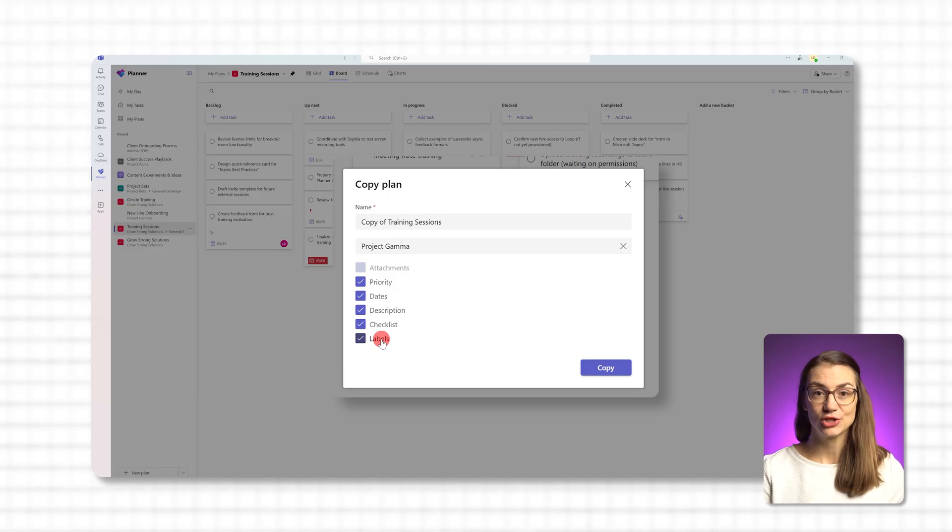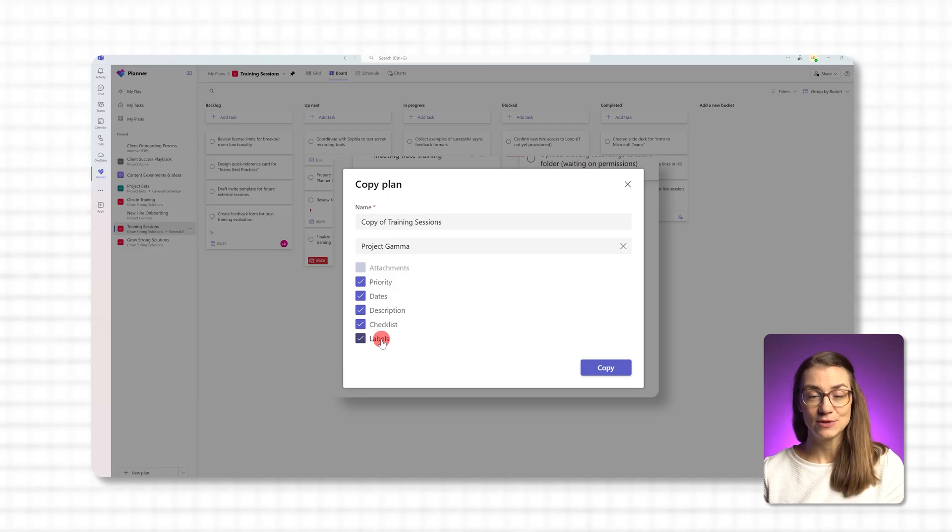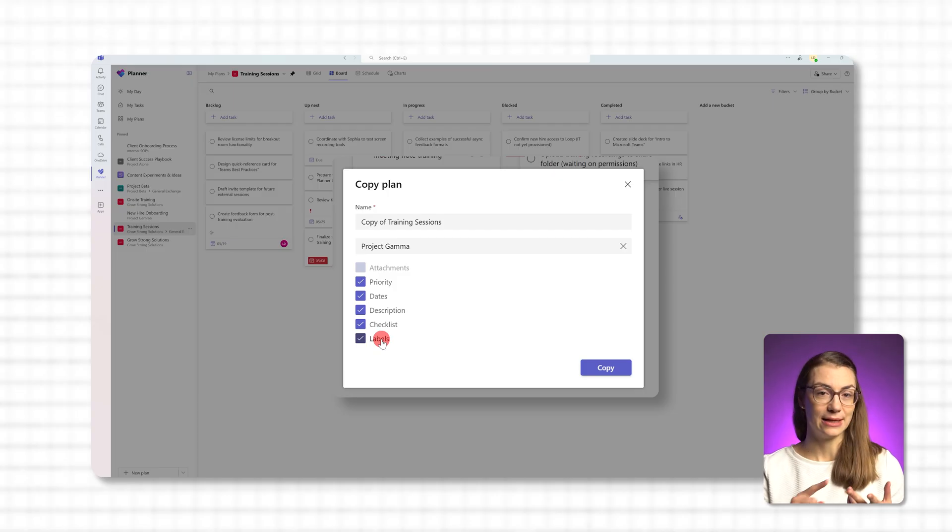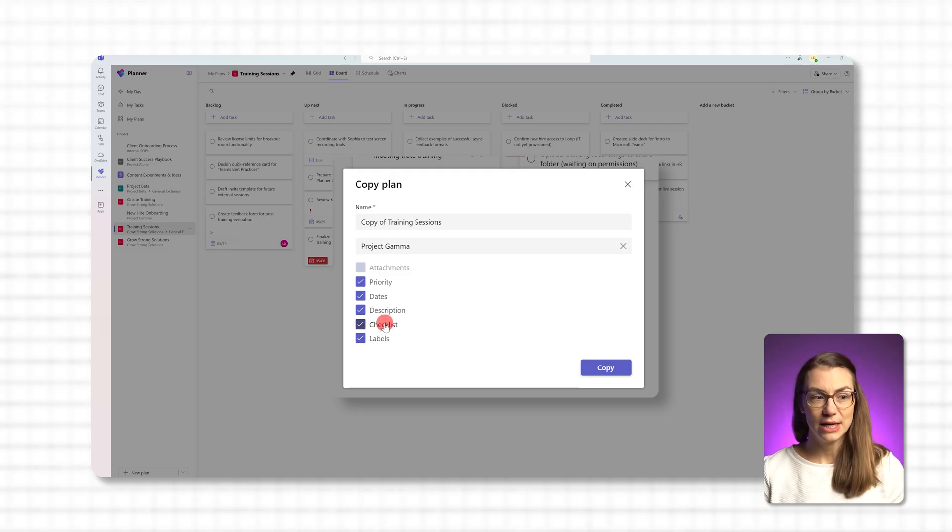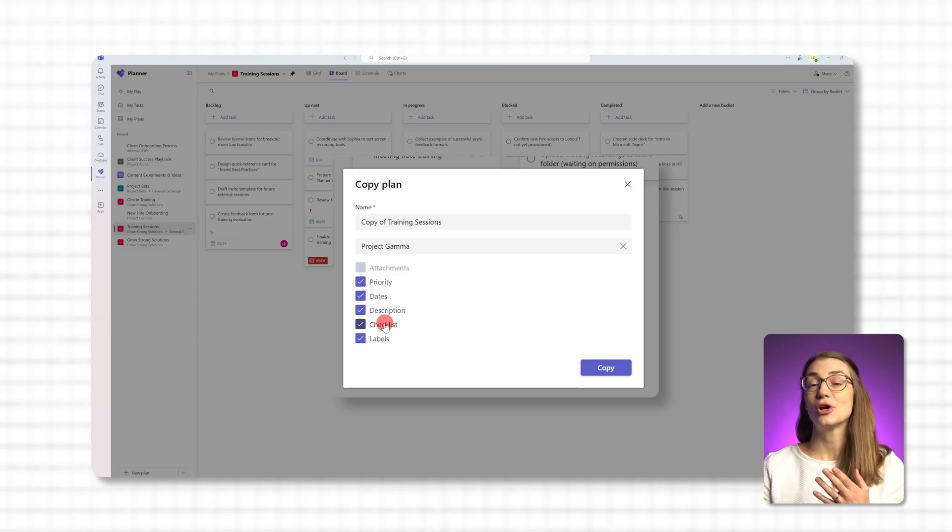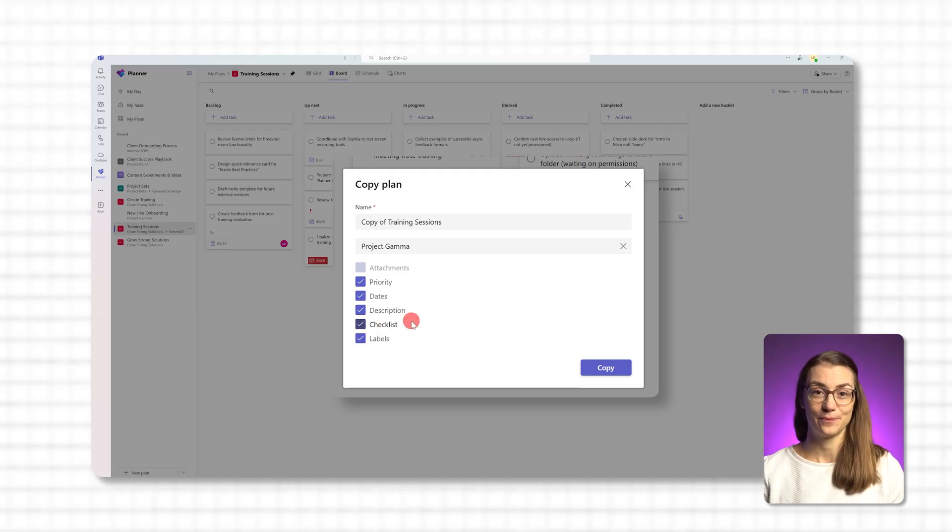Keep just the structure, buckets and task names, or also include details like attachments, priority levels, start and due dates, descriptions, checklists or labels. For example, if you're prepping for your next recurring campaign, you might keep the priority, labels and checklists but leave out the due dates and attachments so the team starts fresh in this respect.